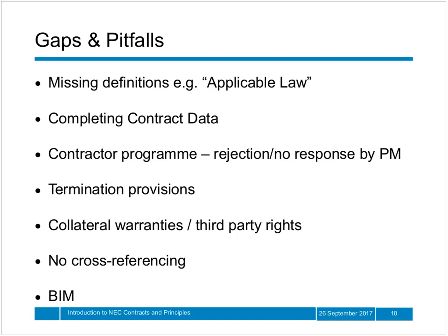So, for example, there is no termination at will by the employer. It is questionable whether a termination at will clause would actually be compatible with the mutual trust and cooperation clause in NEC, but this needs to be considered by parties, particularly employers. There is also no provision for termination should the contractor fail to proceed regularly and diligently with the work. Parties should be encouraged to consider at the outset when the contract may end and, if not covered in the standard drafting, document this accordingly.